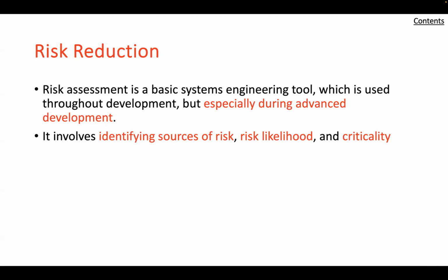To reiterate, the principal purpose of the advanced development phase is to reduce the potential risk in the development of a new complex system to a level where the functional design of all previously unproven subsystems and components has been validated. The typical sources of development risk are described in the functional analysis and design and prototype development areas that we have been talking about.